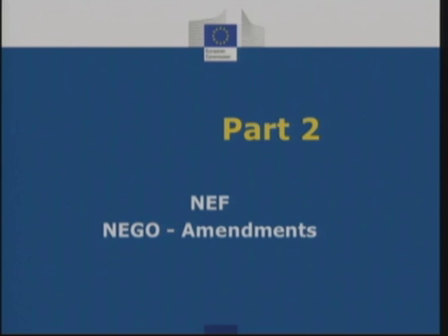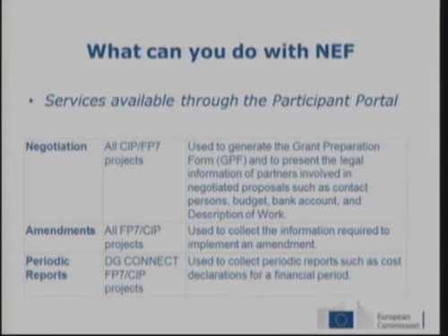Well, my understanding is that you have to open an amendment session, and then within the amendment session, it will be updated automatically by the URF. But in the course of the project, when NEF is in silence, there is not an automated update when something changes at the side of the entities. But when you open an amendment session and we approve the amendment, it will be reflected. You could change the wording of the slide because it can be confusing there. Yeah, it's not very clear, I'm sorry.